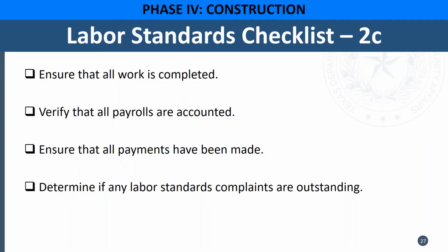This is, again, another continuation. The labor standards officer needs to ensure that all work is completed, verify that all payrolls are accounted for, ensure that all payments have been made, and determine if any labor standard complaints are outstanding. Next slide.